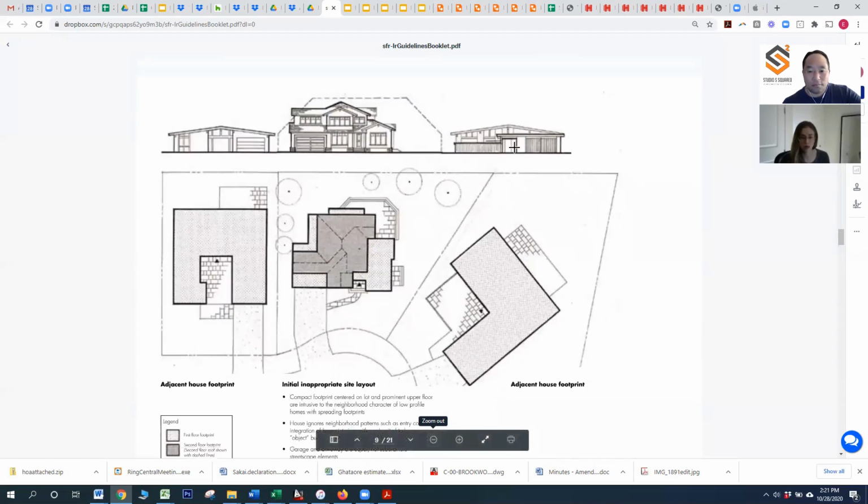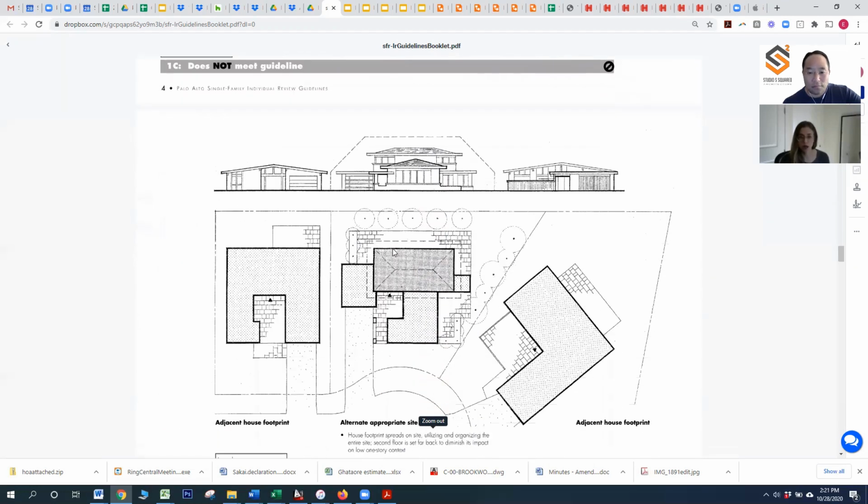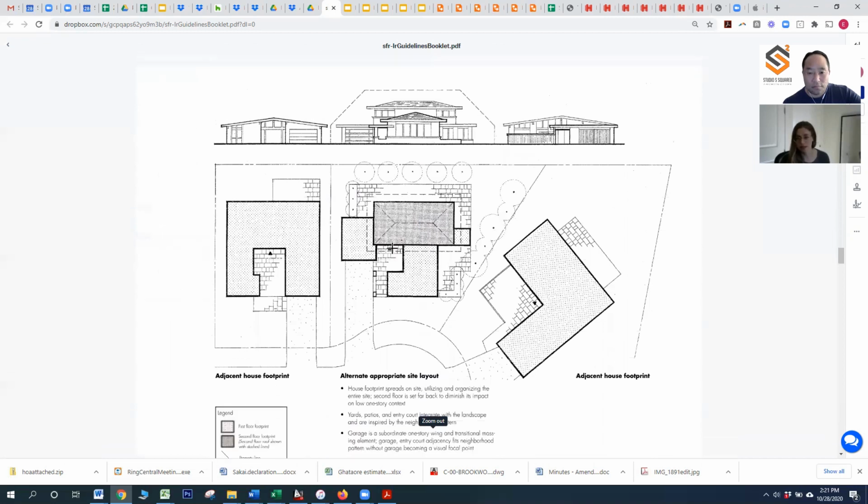And it's important to know these. It depends on the jurisdiction, but it's important to know from experience. Some jurisdictions can be pickier about certain things. For example, in some jurisdictions, we know that they want to limit the first story height. So maybe what we do is we go a little higher than we end up wanting to go, knowing that they're going to ask us to step down the height. That way we can step it down to what we're actually happy with, just in anticipation.